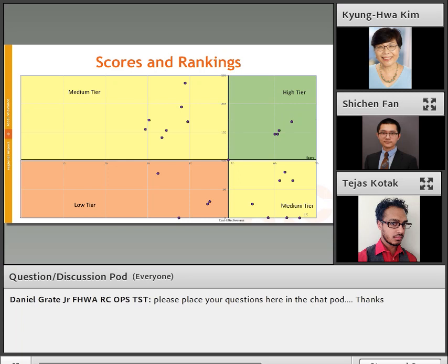as their cost effectiveness. The cost effectiveness is a comparison of what the actual cost of the project will be, as well as their potential to change vehicle hours of delay on their corridor. This is something that our senior staff takes when we are considering which projects to fund, and it gives them a lot of insight into how effective and efficient it would be to spend federal and local money on these individual projects.